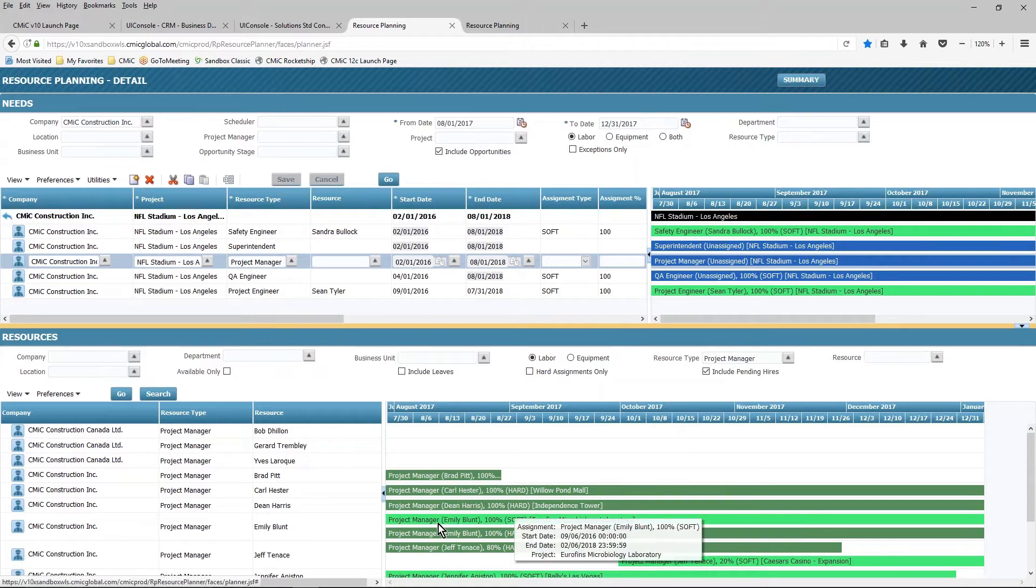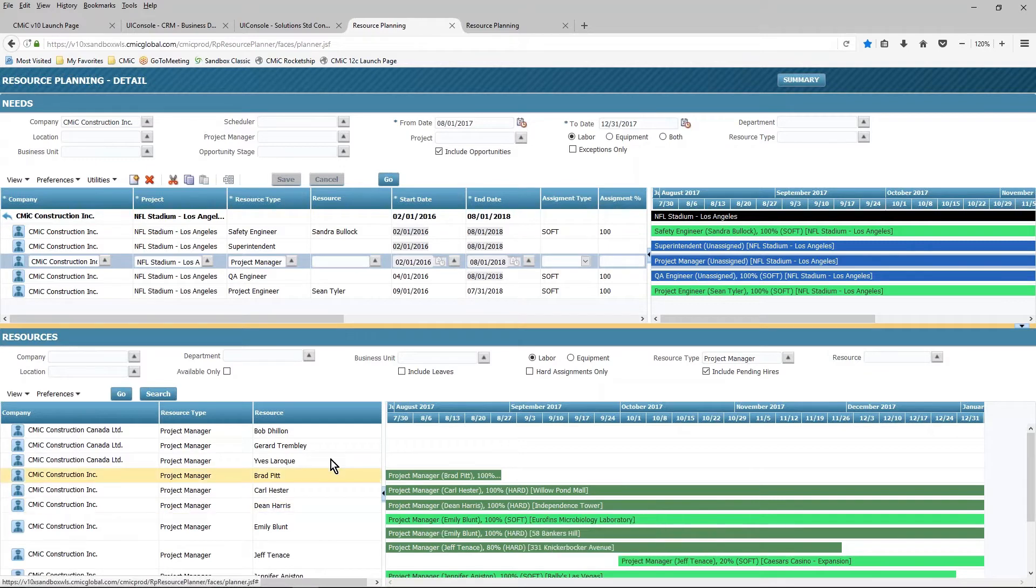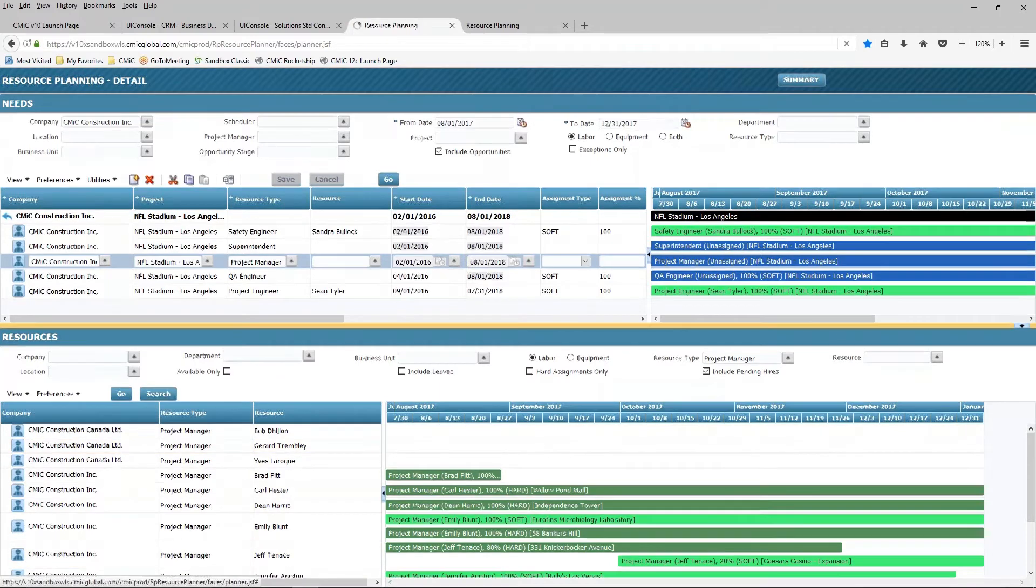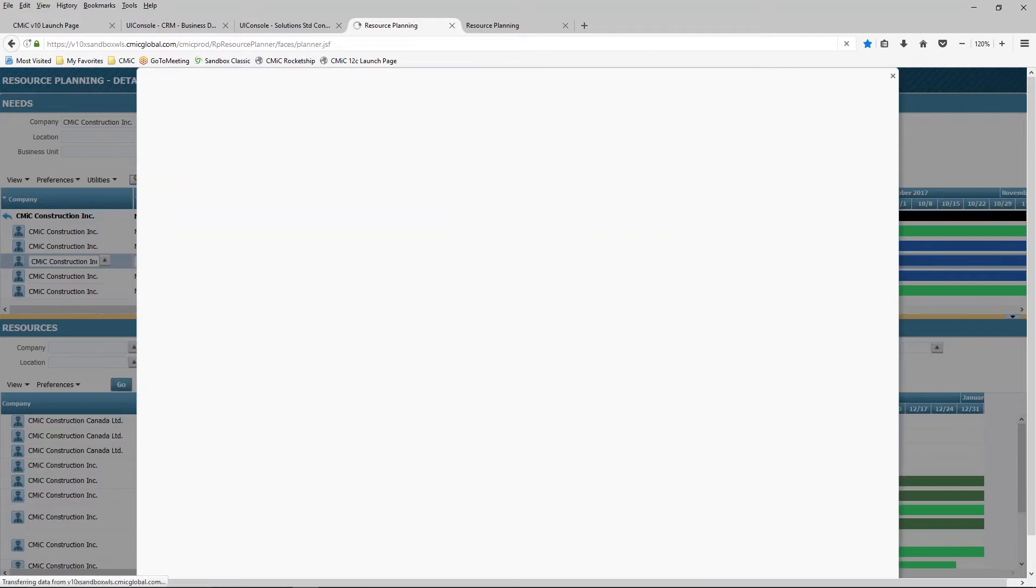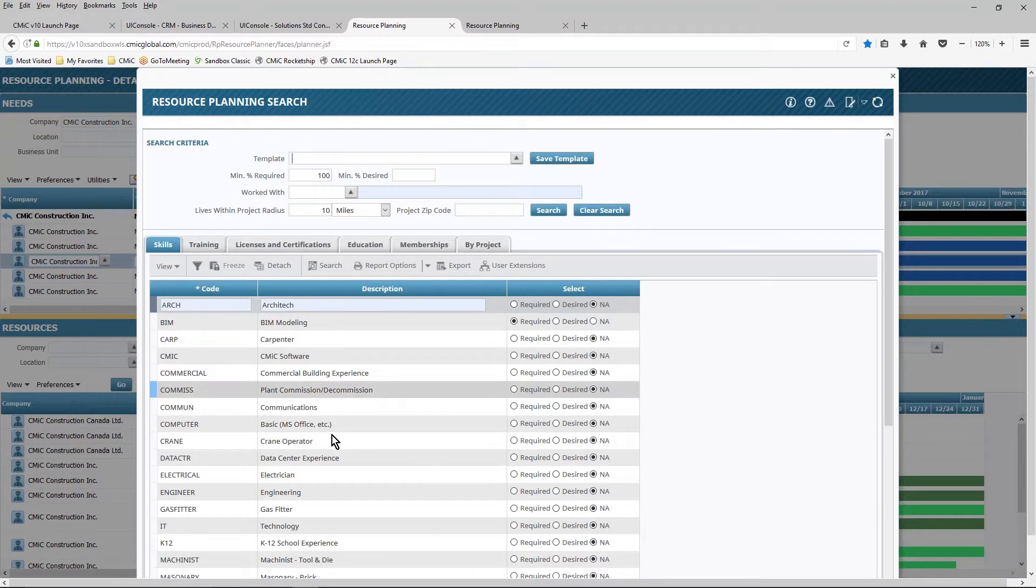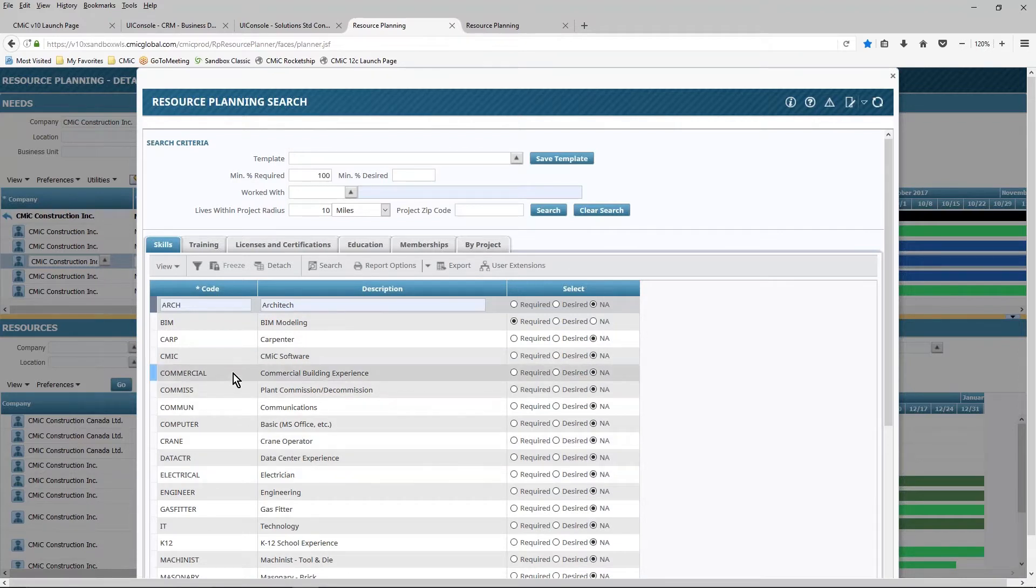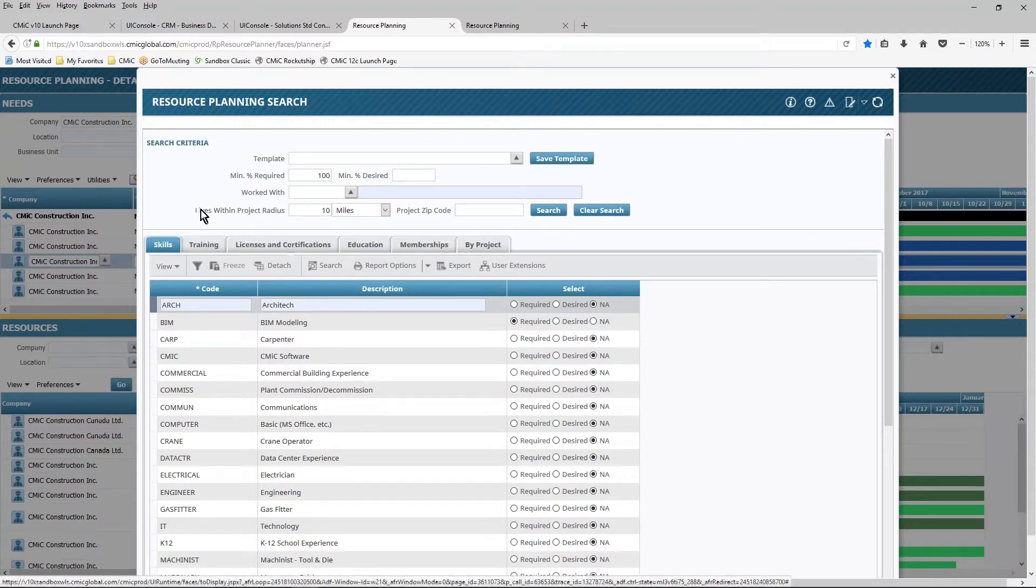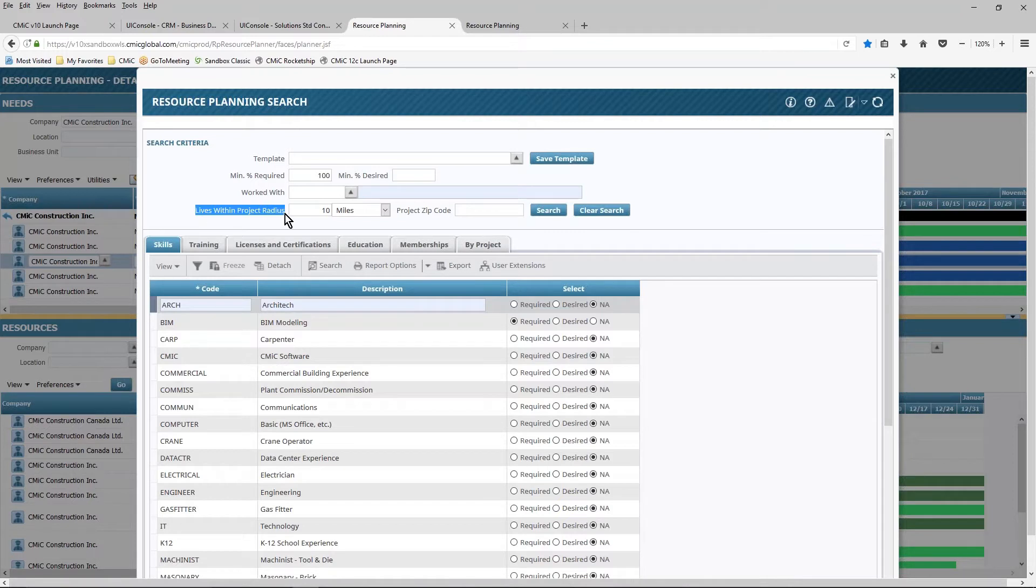Furthermore, it may not be enough to say I need a project manager with a particular set of skills. I can use the search button to say, okay, I need a project manager who has data center experience, or somebody who's got commercial building experience, or somebody that has a HAZMAT certification, or lives within a certain distance of the project, or has worked with this client in the past.